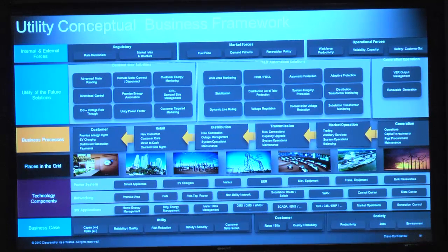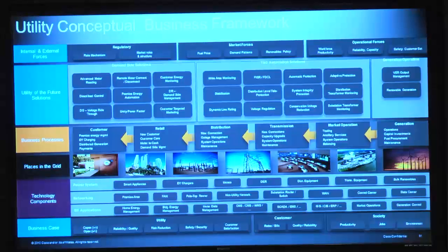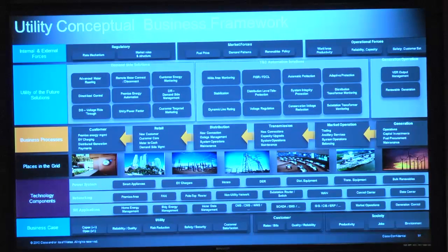So will our routers and our access points that we deploy in the field today still be relevant in 4 years, 5 years' time? If we deploy cellular to the meter today as an option, we may deploy 1 million meters today, but will that 3G cellular solution still be available in 5 years' time, or will the service provider cut it off and force the utility to now go back and revisit every single meter again just to update a comms module solution? Is your technology going to be long-lived?